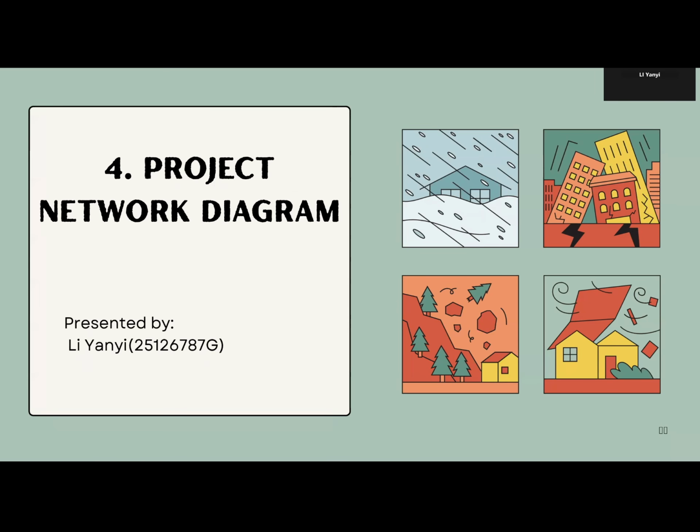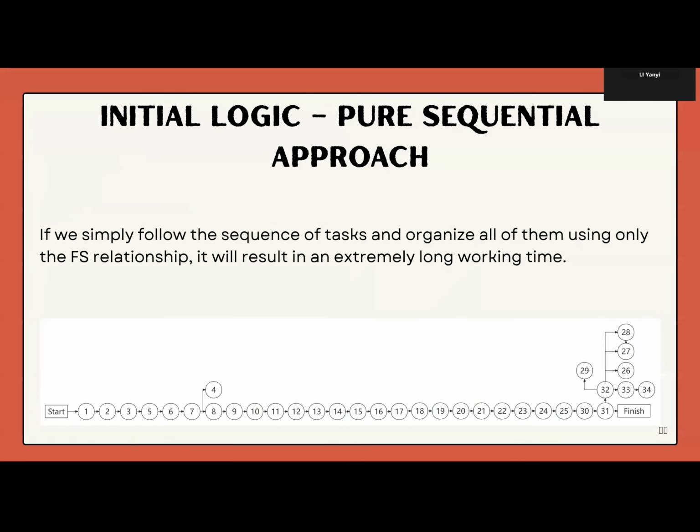Next, we constructed a project network diagram. Initially, we tried a purely sequential approach using only finish-to-start relationships. However, this resulted in an excessively long project timeline.